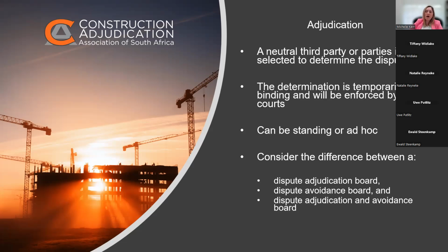He might change his mind if they refer it to him as a dispute and give him a reason to change his mind, whether they change the clauses they rely on or produce additional documentation, but he can give a preliminary opinion, which might cause the parties to say, oh, no, we're not even going to bother to take it to dispute. It's a waste of time and money. Let's just carry on on the basis of this opinion.